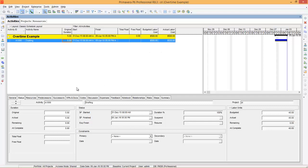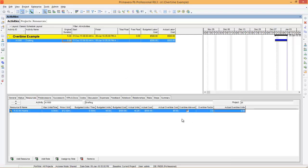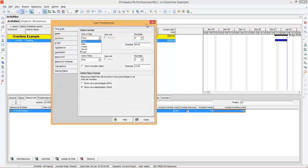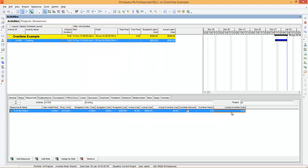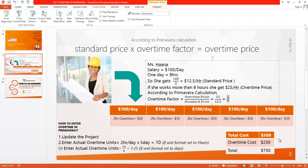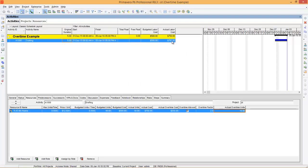But we didn't consider the overtime cost here. Go to Resources and add columns like actual overtime cost, overtime factor, and actual overtime units. When you come to actual overtime units, you need to enter how many units Miss Hanna has worked as overtime. In user preferences I have set it to hours, so Miss Hanna worked 2 hours daily for 5 days — that makes 2 times 5 equals 10. Enter actual overtime units as 10. Now you can see the program has calculated the actual labor cost as $750.